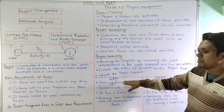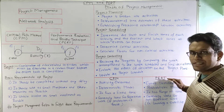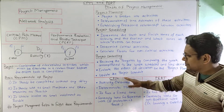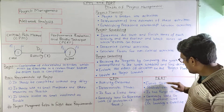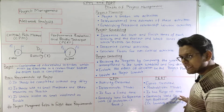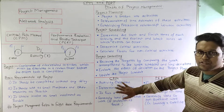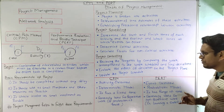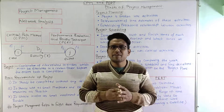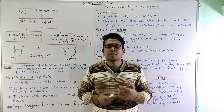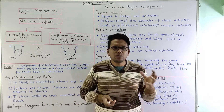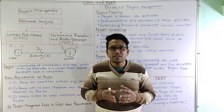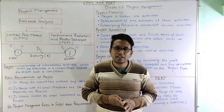To review: CPM is activity-oriented, PERT is event-oriented; CPM is a deterministic model, PERT is a probabilistic model; CPM has a fixed time for activities, PERT has a range of time; and CPM is generally used for repetitive works while PERT is used for non-repetitive works. This is a brief introduction to CPM and PERT. In the coming lecture we will see how to construct a network for CPM and PERT problems. If you liked the lecture, please share it. Have a nice day!